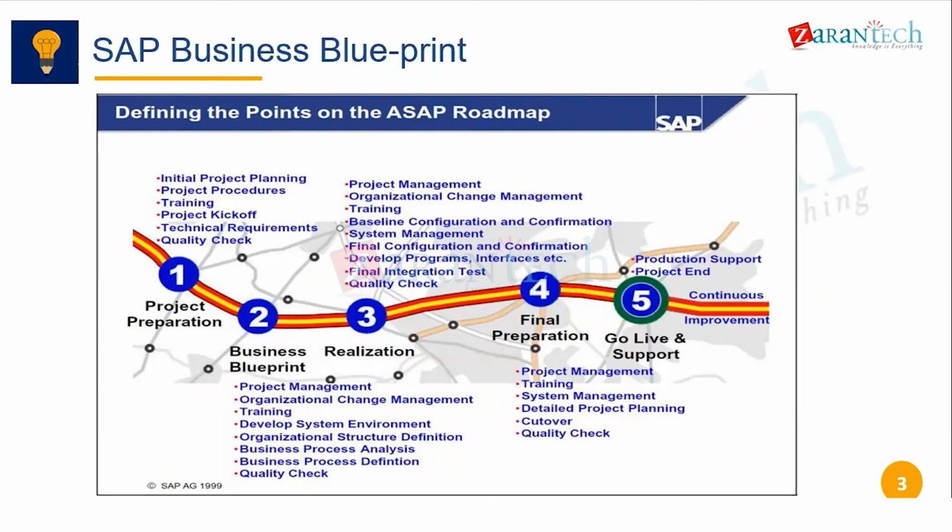So basically, Wipro will prepare as a part of the handover. They will give all this documentation: the business blueprint document, and then they will also provide the configuration document and the RICEFs as a part of the realization. All those things they will provide, and the test results will also be available to Infosys. And they will only chip in after the hypercare period is over.